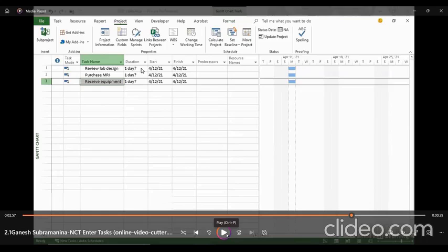This is an estimated duration. Whenever we see a question mark in the duration, it means that we have not added our planned durations yet. Hence, it is just a reminder to get around to doing that. In addition, the start date for these tasks is set to the project start date.